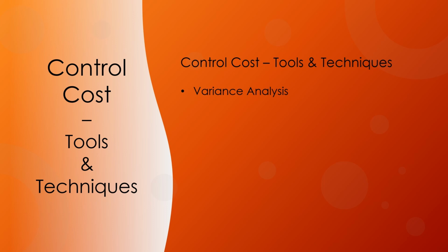Variance analysis as used in the EVM is the explanation for cost, schedule, and variance at completion. Cost and schedule variances are the most frequently analyzed measurements. For projects not using formal earned value analysis, similar variance analysis can be performed by comparing planned cost against actual cost to identify variances between the cost baseline and the actual project performance. Further analysis can be performed to determine the cause and the degree of variance relative to the schedule baseline and any corrective or preventive actions needed.